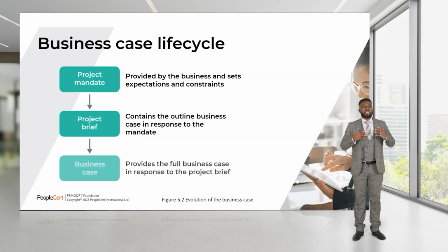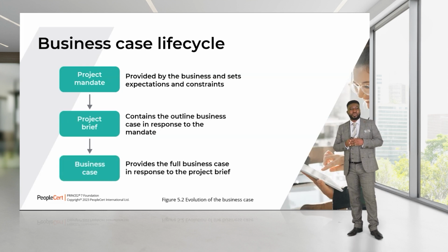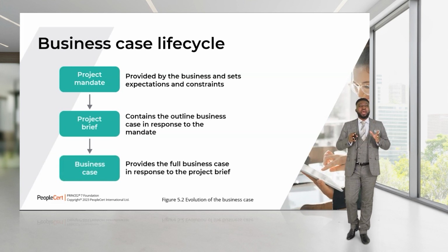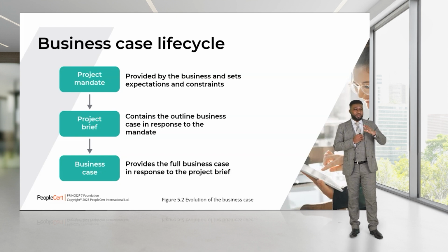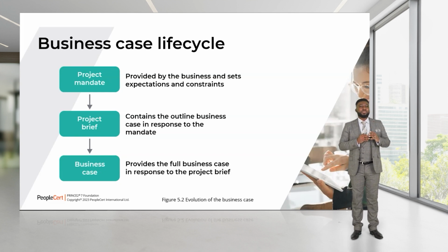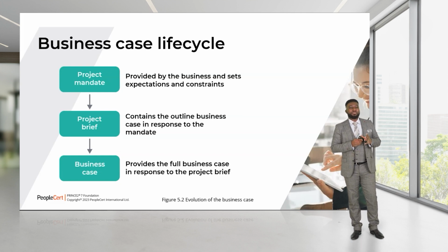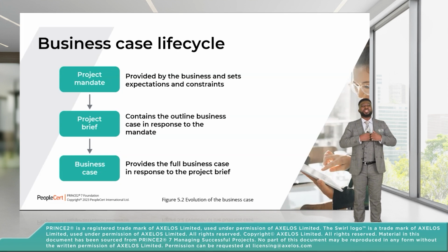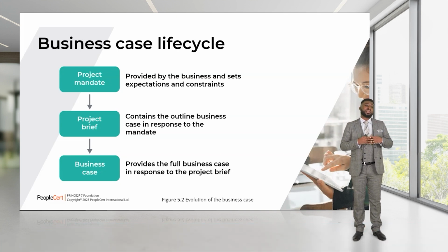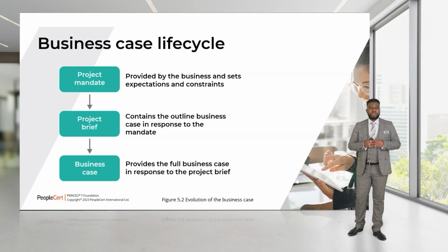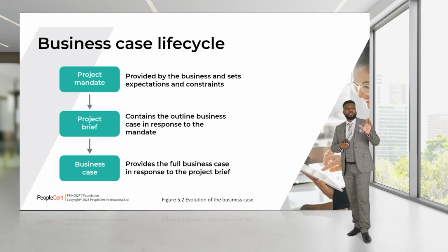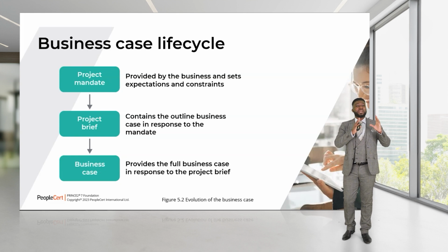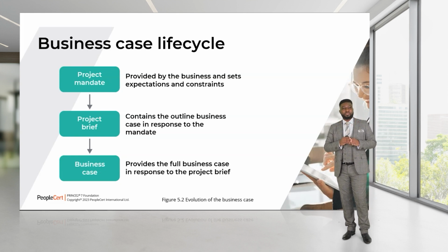When it comes to the business case lifecycle, in terms of the project mandate, when we're talking about startup or before startup, we said that there is a project mandate that triggers startup. The purpose of the project mandate is basically for the sponsoring organization to provide us with a general overview of what they want, as well as the constraints. And we also said they will set things like the project level tolerance. The project mandate provided by the business will set expectations and constraints.